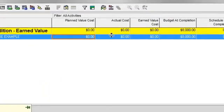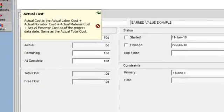Let's move over and talk about actual cost. Actual cost is the actual total cost incurred for the work accomplished as of the data date. It is calculated as actual labor cost plus actual non-labor cost plus actual material cost — all derived from resources — plus actual expense cost. Actual cost answers the question: how much did the completed work actually cost?